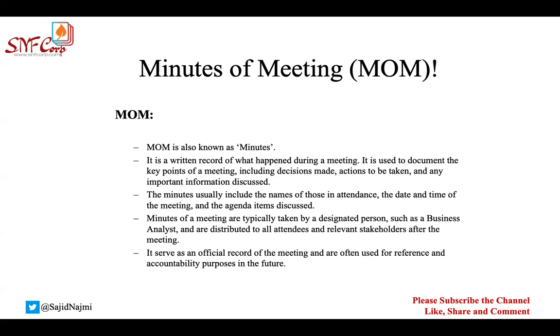So it is very important for you to write things very clearly, very precisely, and you need to document if there's any action and what is the due date. That is very important. We cannot have a simple action without a due date. Due date is very important. When are we going to close, and targeting to close that thing? So that is very important.